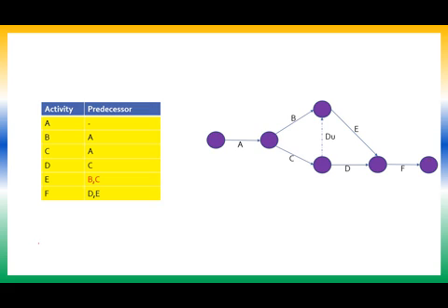So all activities are handled, right? Once all the activities are handled, what is to be done next? Numbering. So which is number 1? Without any doubt, this is node number 1. So delete this. This becomes 2. Delete this line and this line, which becomes 3. This cannot become 3 because there is an incoming dummy. Therefore, this becomes 3. Okay?